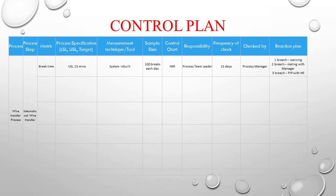The first tool is the control plan. For example, the process is the wire transfer process, the process step is the international wire transfer, and the metric we are improving is break time — the break time of individuals was a significant contributor to the overall cycle time. If we reduce the break time, we can control the overall cycle time. The upper specification limit is 15 minutes. The measurement technique is a software built into the systems that records when a break is taken.